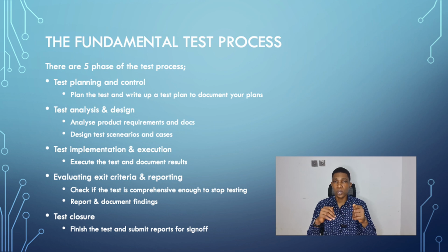So you submit your test report to all the stakeholders: the project manager, the developer, the whole stakeholders involved in the development. If the objectives have not been met, of course, you have to return to test execution with developers and ensure that the objectives are met by retesting the software, submitting the list of defects to the developers, to ensure that they are fixed. And so when all the defects have been fixed, you prepare a test summary report and submit it to all the stakeholders, like I said earlier.